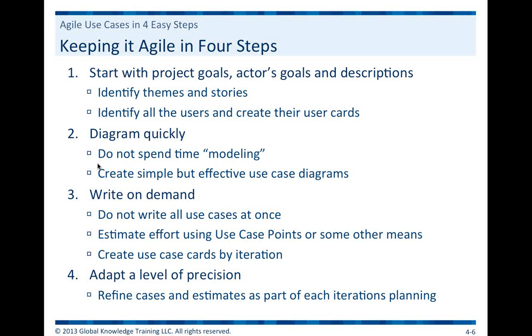And so what we do here, when we're using our use cases, the first thing to do, at the very beginning of your project, is to identify all the different actors. And by actors, basically users. You have to identify this right at the very beginning so that you can start planning out your use cases. So my first major step is to identify all the people that are going to use the solution. Then you start talking to them, and you start identifying the general themes and stories that need to be conquered within the particular project.